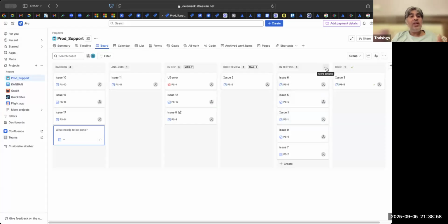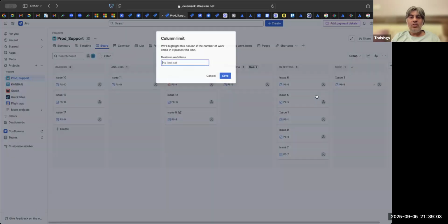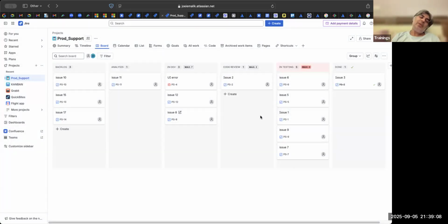Either you increase the QAs, but at the moment only one QA is there. So you put 3. You ask Sudipta, Sudipta says, yes, I can handle 3 tickets. Anything more than that, it is too much for me. Delivery is screaming at me. Why are so many tickets in testing? What is happening? Nothing. She has too many tickets. So you put a limit here. So now either you can put it in block or you can put it back.